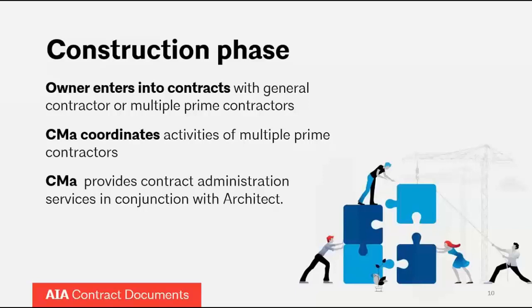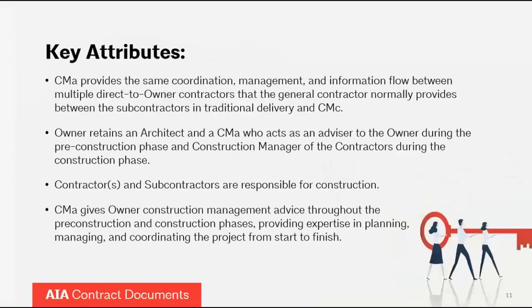During the construction phase, the owner enters into contracts with either the general contractor or multiple prime contractors. The CM is going to coordinate the activities of multiple prime contractors if that scenario exists on the project. Then the CM is going to provide contract administration services in conjunction with the architect. The CM as advisor provides the same coordination, management, and information flow between multiple prime contractors that a general contractor normally would provide between subcontractors in the traditional delivery model.